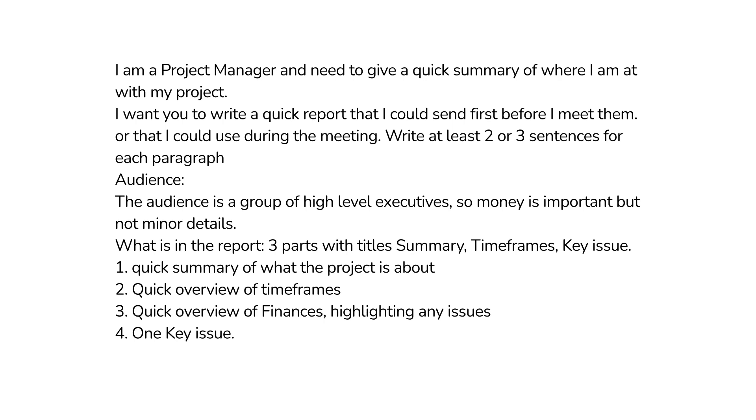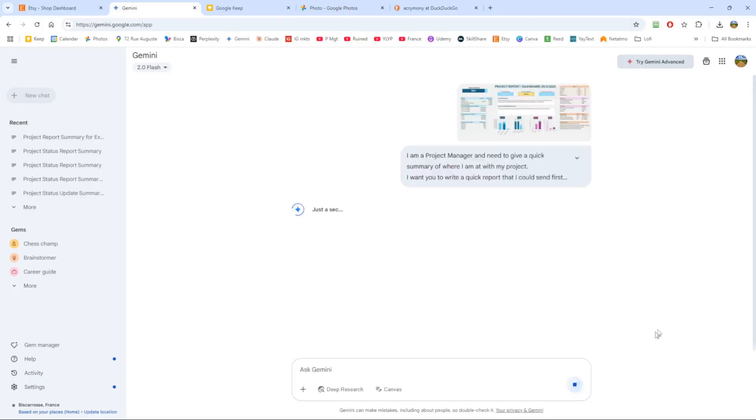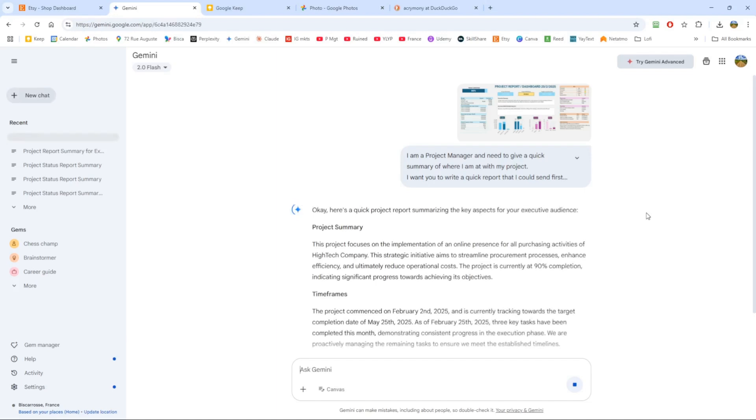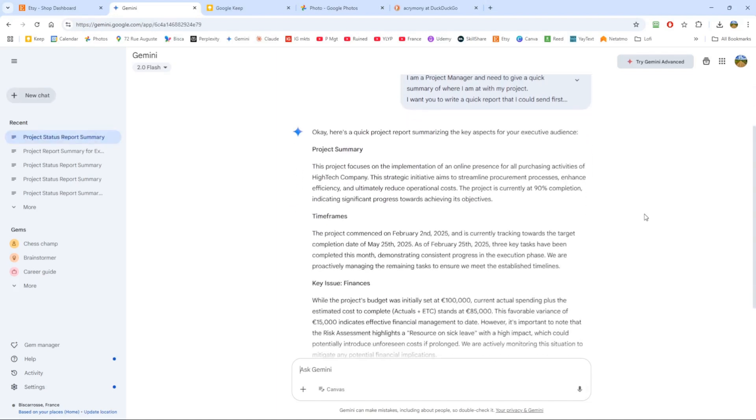I want a quick summary of what the project is about, a quick overview of the timeframes, and to highlight one key issue. It's always important when you talk to executives to get something out of them—to get them to help you on issues.